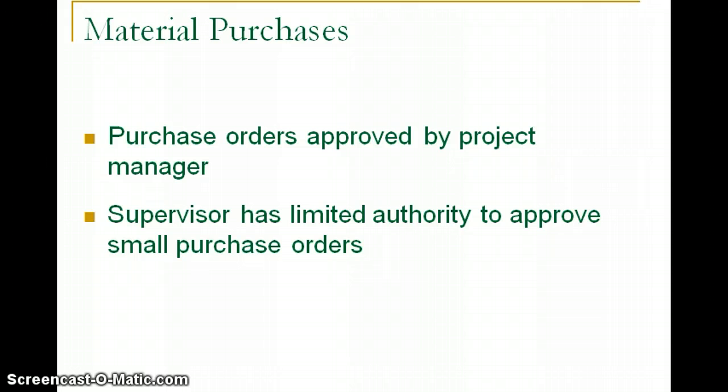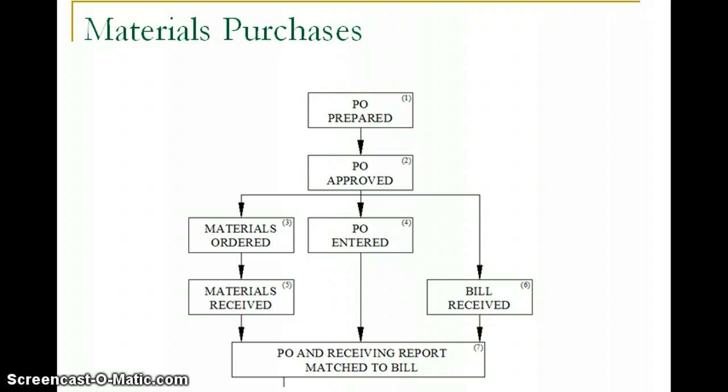Sometimes the project manager may have some limited authority to prepare and issue purchase orders. Some companies may set limits in the amount of money that the project manager has authority in issuing a PO. A limit could be in the range of $5,000 to $10,000 or perhaps more. The purchase order is prepared again by either the accounting department or the bookkeeper, or perhaps directly by the PM.